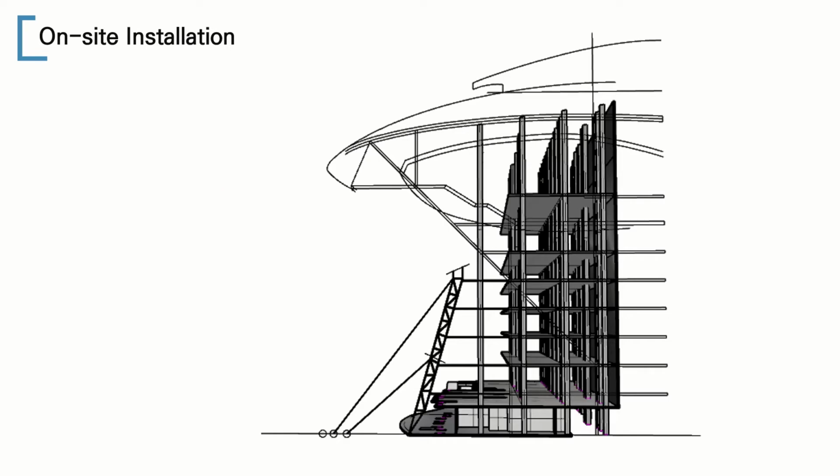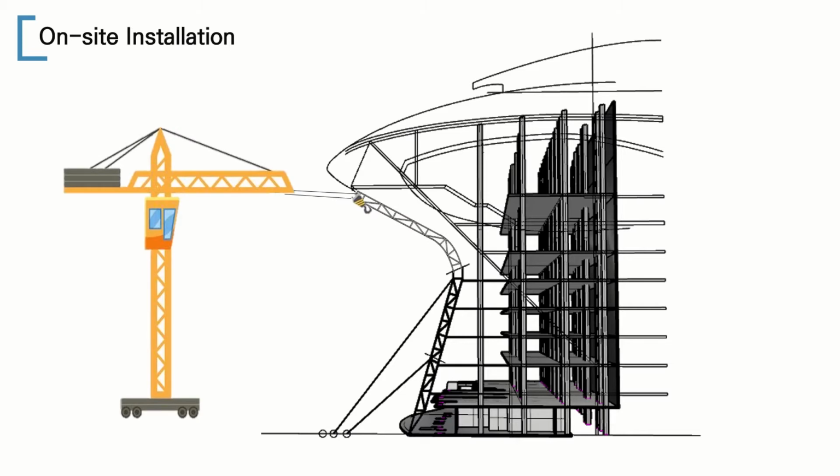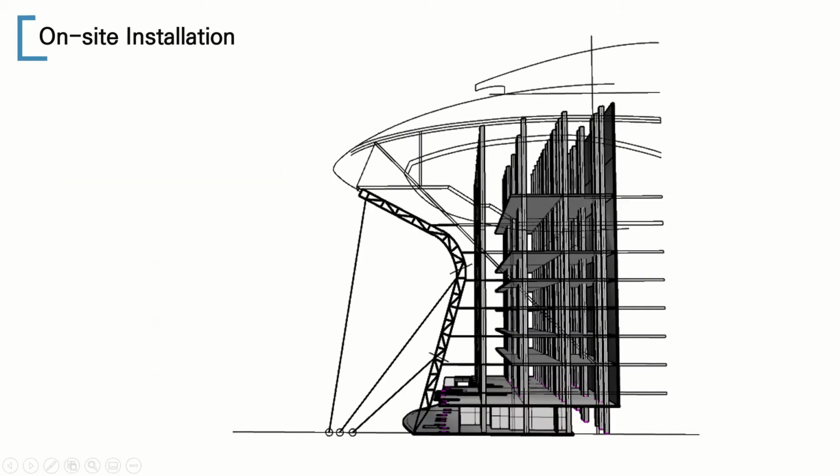Retain the lever and install the wire as in the first. Install the third unit with the tower crane. Likewise, fix and install the wire. When these 3 units are installed up to the 9th floor as a set, a line is completed.